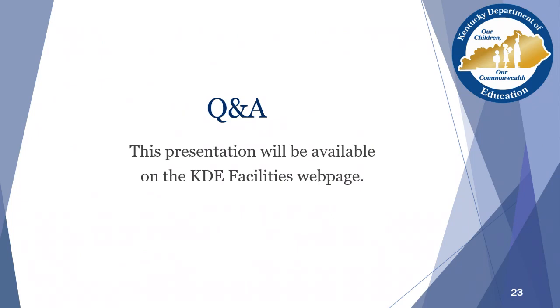And Jody, do we have any questions today? We did receive one question. I went ahead and answered it and published the question for everyone to view, as well as the answer. The question was, I submitted a BG1 in FACPAC on Tuesday of this past week and I did not receive an email. How long does it take to receive the email? The answer that I provided was you will receive an email once the BG1 has been approved. You can refer to FACPAC to see the current status of your BG1, as there are several iterations of review before final approval. Right, and the regulation allows 30 days for a review and approval of a BG1.